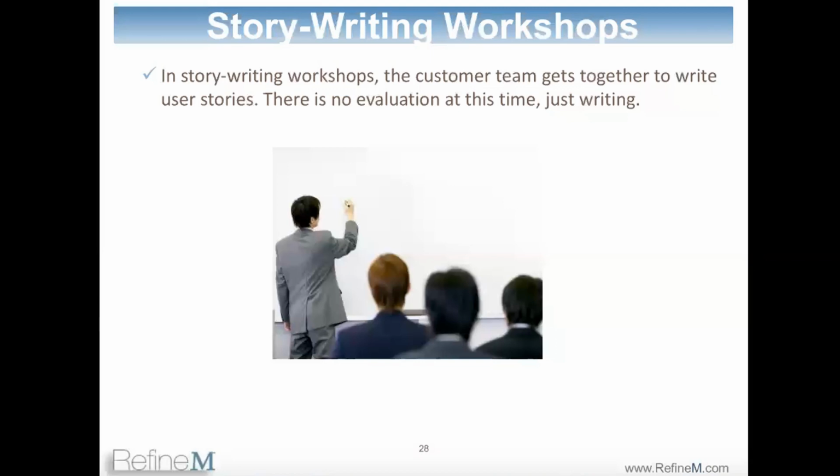So that refinement happens when you estimate and you do your release planning. The further refinement to the story can happen when it is picked up for the sprint, and when the development team start thinking about how they're going to implement it. They may start dividing them into tasks. So at that time, the story may get further refined. So there are multiple iterations that take place to take a story from the start to deployment. It is not completely detailed out until done, kind of a thing.